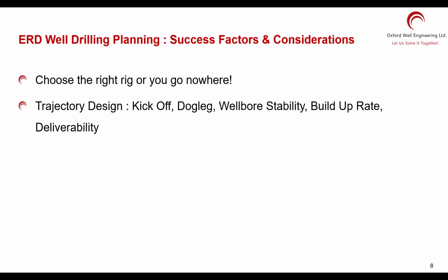Then you talk to the drilling engineer. Go back to the drilling engineer, or sit down with them together maybe. Have an iterative session. I have seen this myself. I was the well planner for some time for ERDs. So it took us almost a week, about 25 different trajectories with the geologist and the drilling team. They keep massaging the changes. They keep changing this and that.